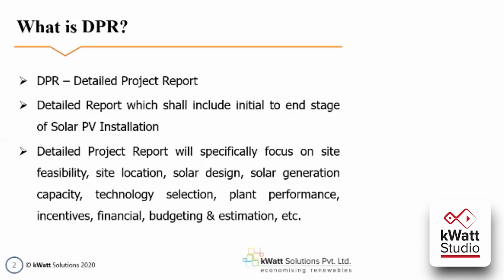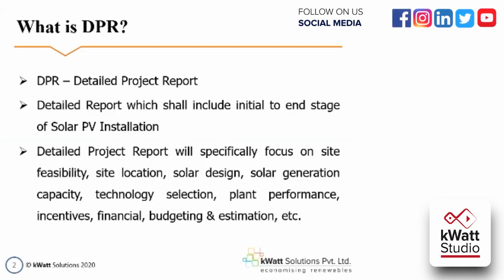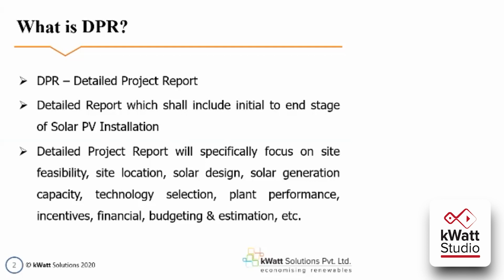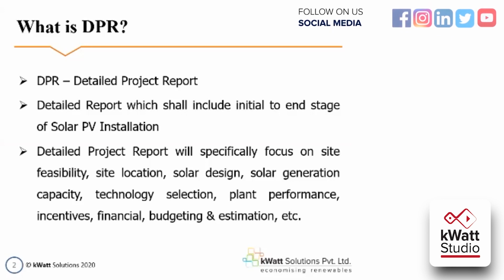So what is DPR? The full form of DPR is detailed project report. It should include everything from the starting to the end of the solar project execution, from day one to the last day of commissioning, like the site feasibility report, site survey, site assessment, and solar designing, the steps taken in solar designing, how you are designing your system and what parameters you are taking to design your solar system. Then the solar generation capacity, the generation of the solar PV system over the year and over 25 years, which you are going to calculate using simulation software.